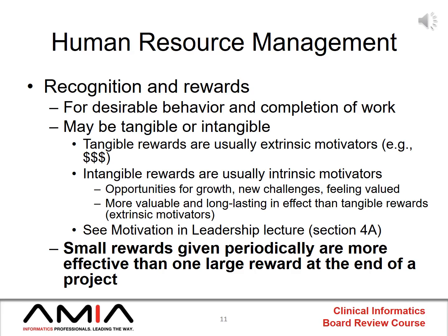Intrinsic motivators or intangible rewards are those opportunities for growth, education, new challenges, or things that just make people feel valued. And these motivators are far more valuable and long-lasting in effect than tangible rewards, otherwise known as extrinsic motivators. The other thing to point out is that small rewards given periodically are shown to be more effective than one large reward at the end of a big project. So if you're in the middle of an EHR upgrade or an implementation, it's really important to reward hard work at smaller increments along the way rather than to wait until after go live.